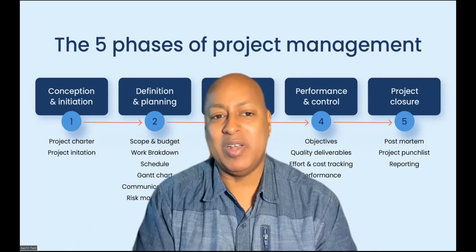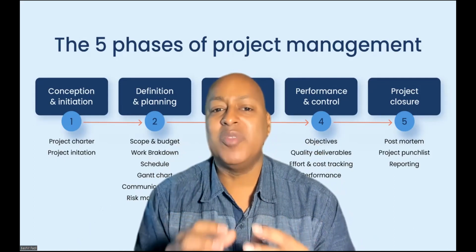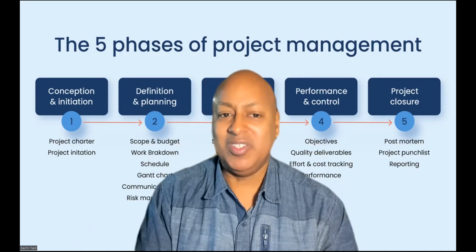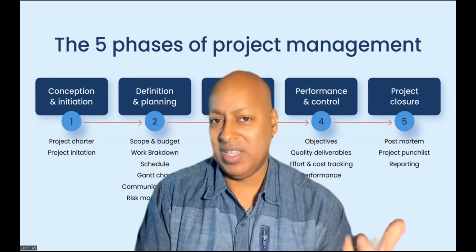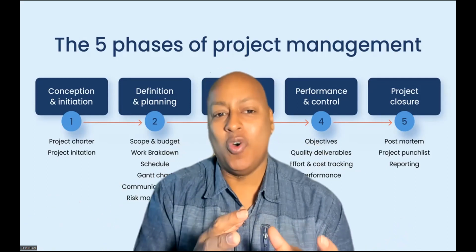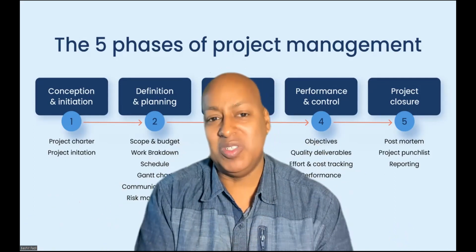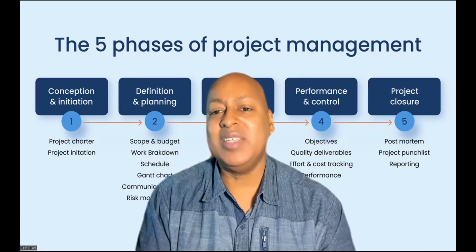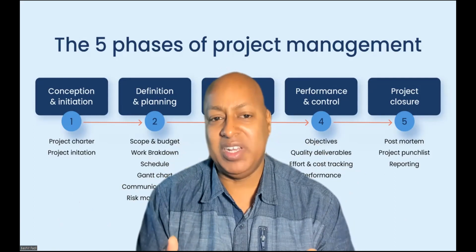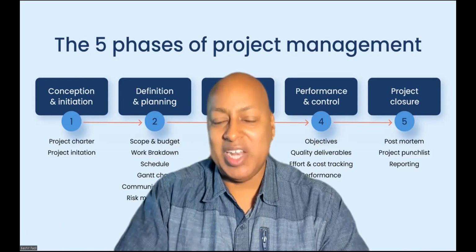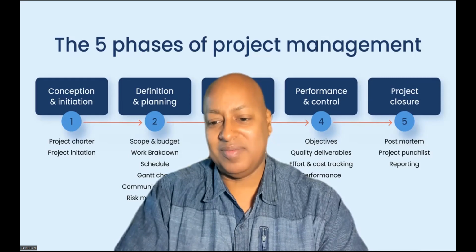And that's why when we talk about a risk register or issue register, those are common tools for identifying, analyzing, and managing risks and issues. A risk is something that could happen and move us from our delivery date, or something that has actually happened, which is an issue. Using those registers, project teams can estimate and adjust their planned activities, taking into account risks and issues, thereby managing their impact.